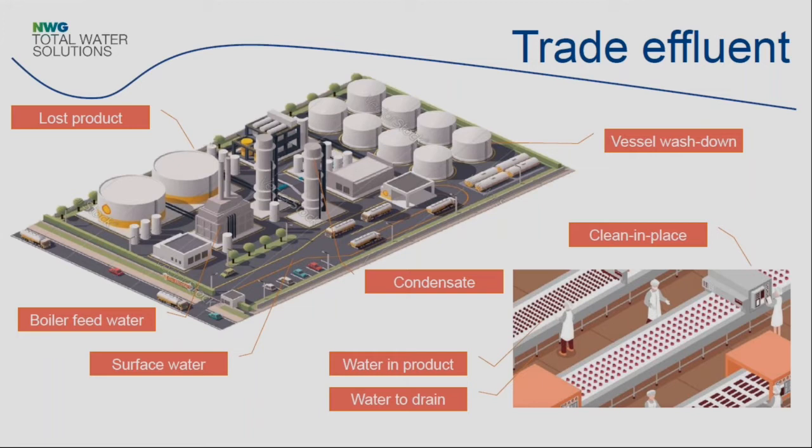And again, I went round, did a factory audit and came up with some options which effectively sorted the problem out. It meant that they didn't actually need to put in a treatment plant. They could do everything they needed to do just by changing the way the factory operated. And that's quite a glib statement.